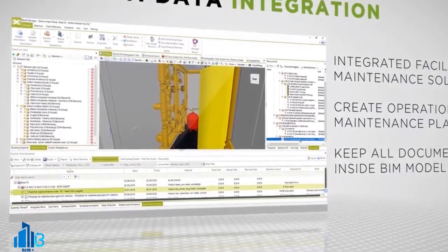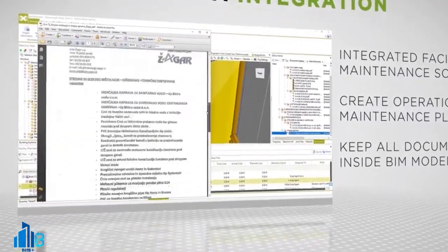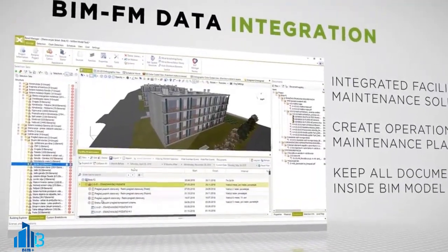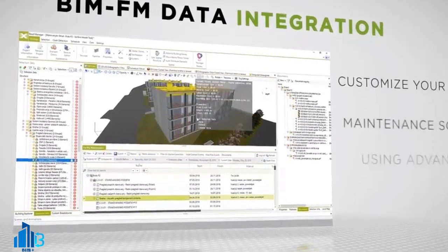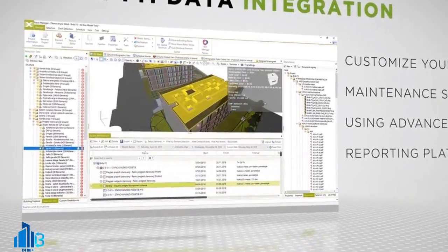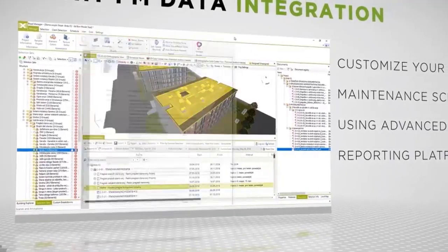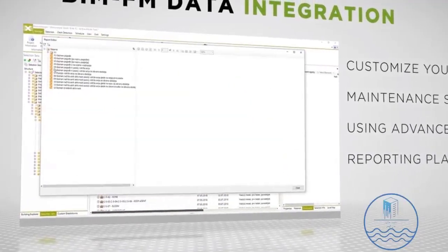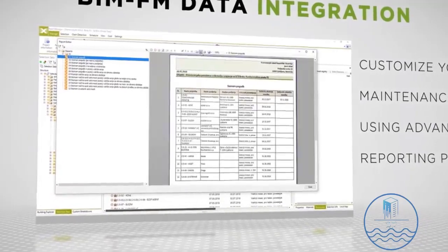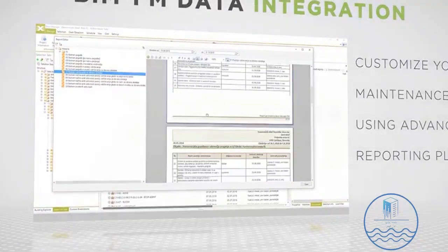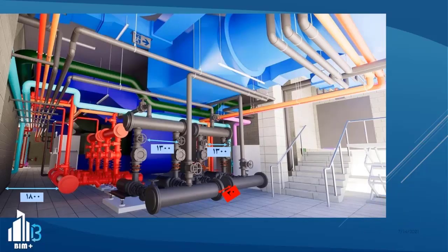During repair and maintenance, you can list the inspection dates of your facility equipment to have a smart checklist for their periodic repair or inspection. In this smart list, the manufacturer, catalog, installer, and similar specifications are connected to the 3D model containing information in which their placement is indicated based on the latest maps, which are your as-built files.